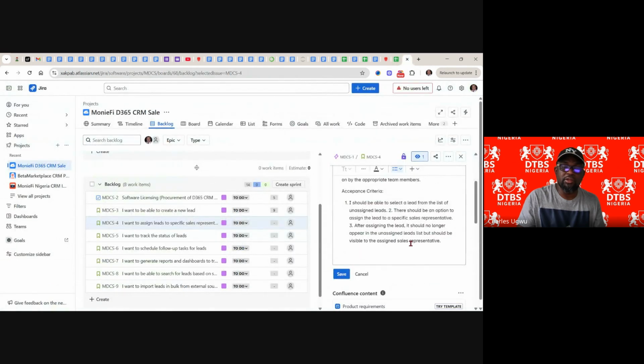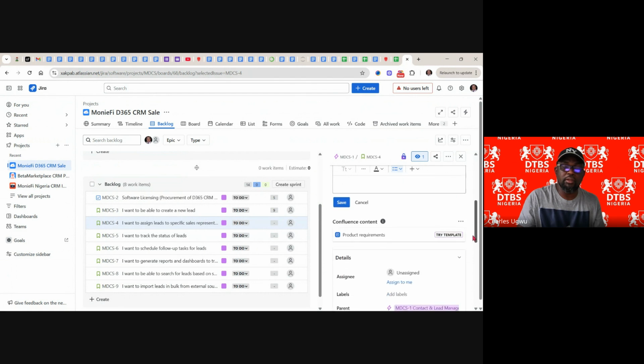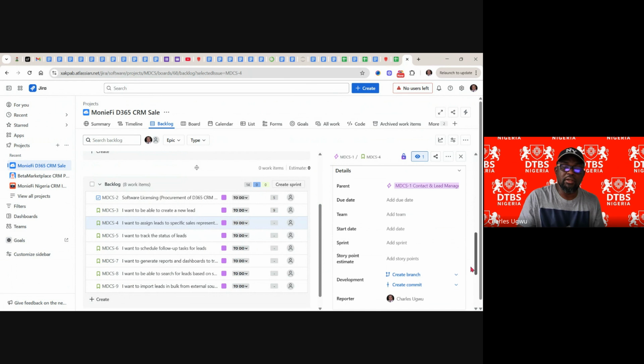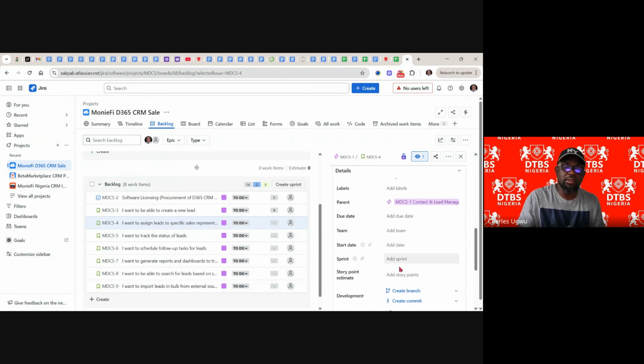Let me clarify this story point before we make a mistake here. All this work, the story point, yeah, the team takes the decision on the story point. But the actual people that are going to work on that work item are the ones to determine it; they are going to see how they feel they can do this work. Because you, the business analyst, if you are not the one configuring or customizing this, you cannot tell developers that the story point is 9, it's complex. 9 story points means it's going to take some time to do.